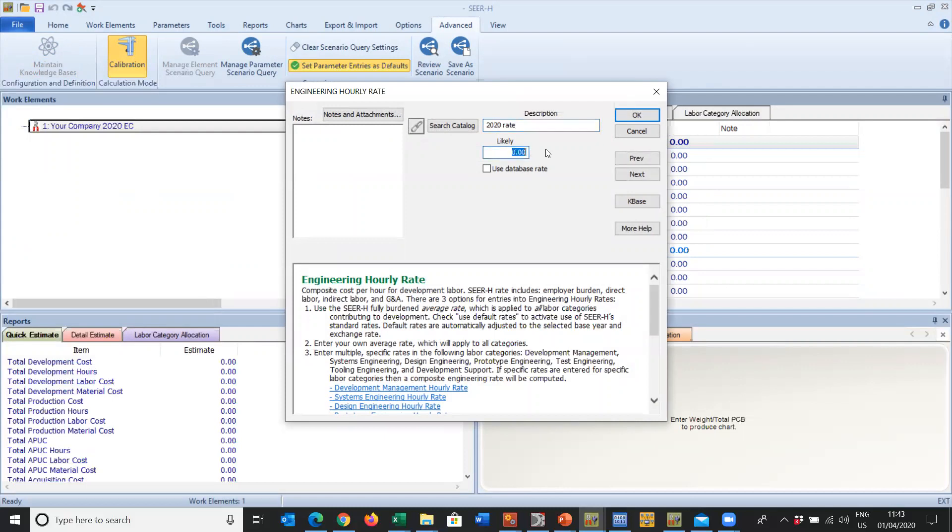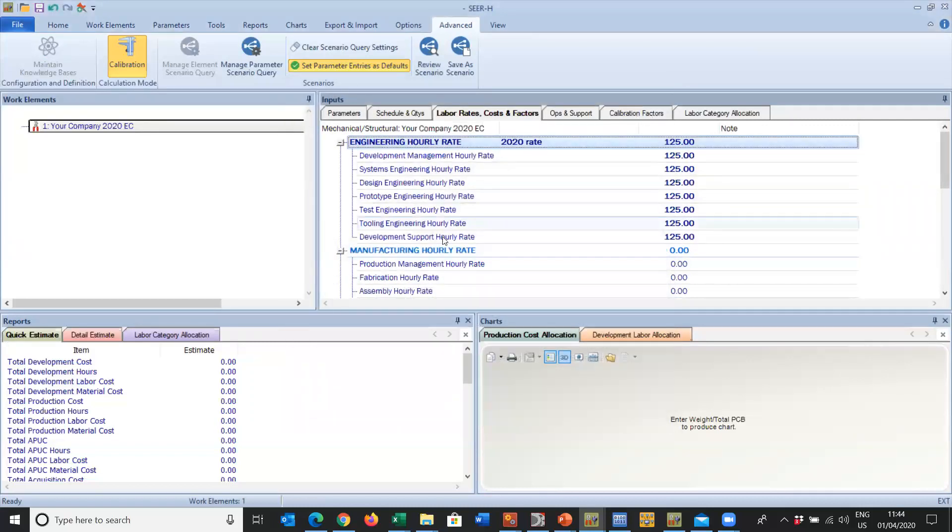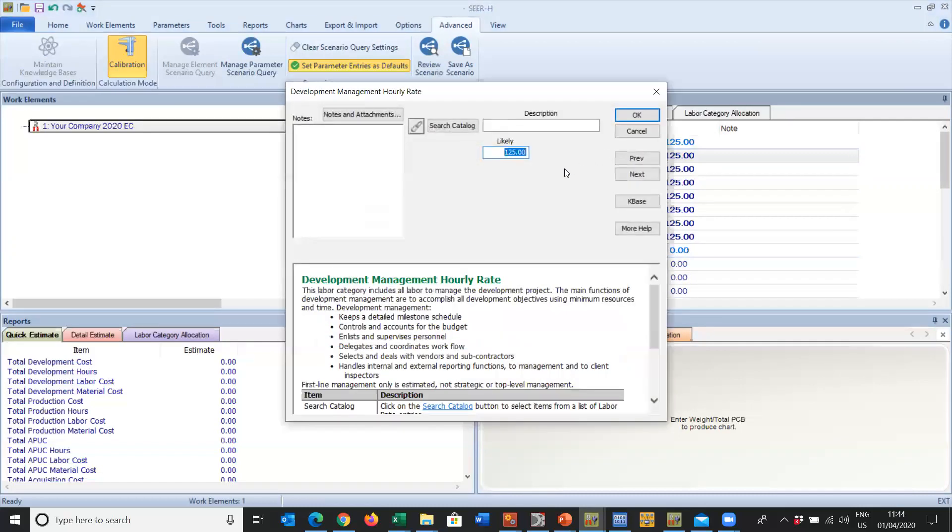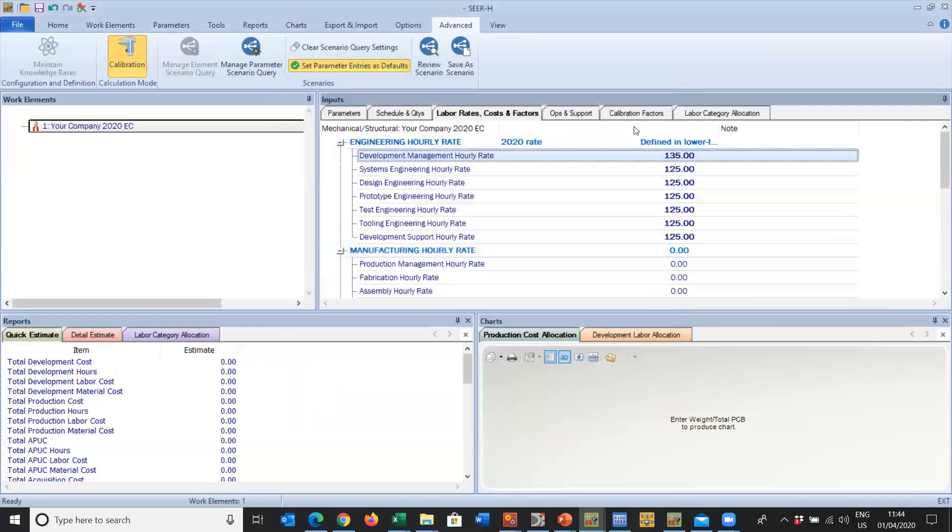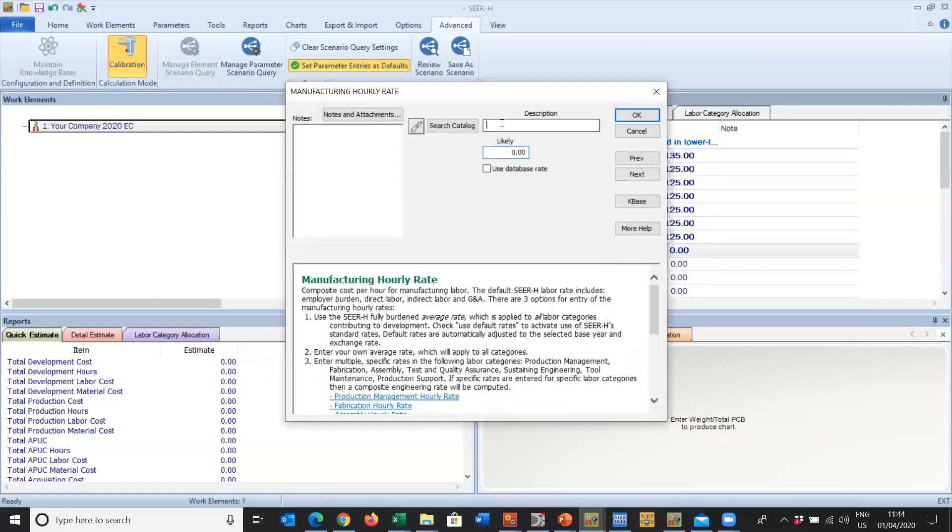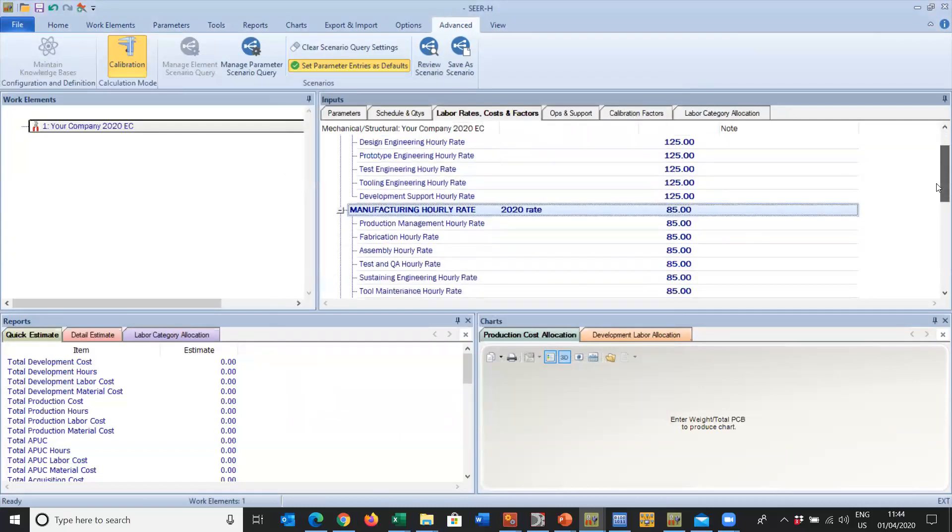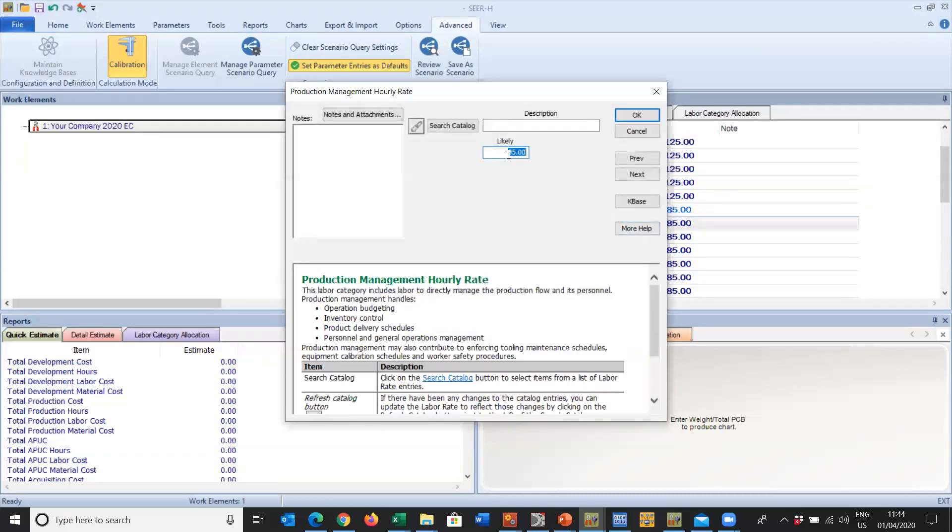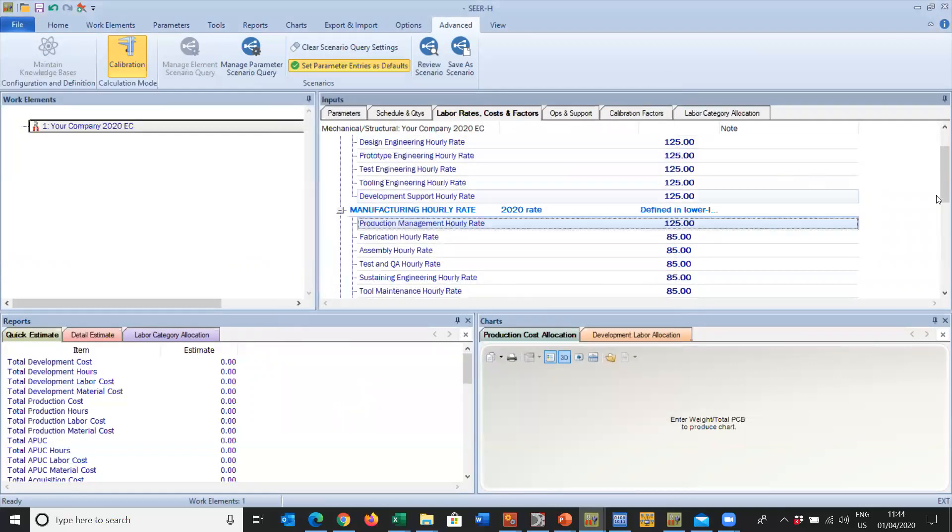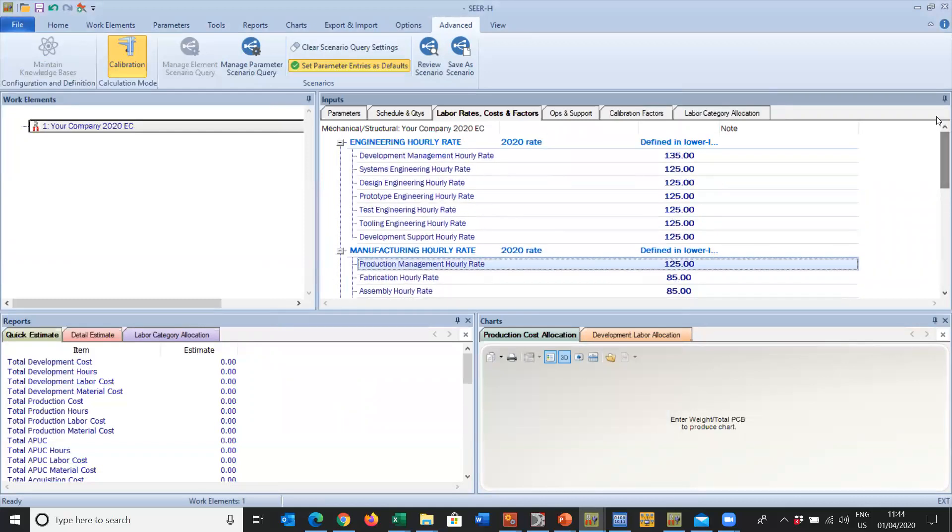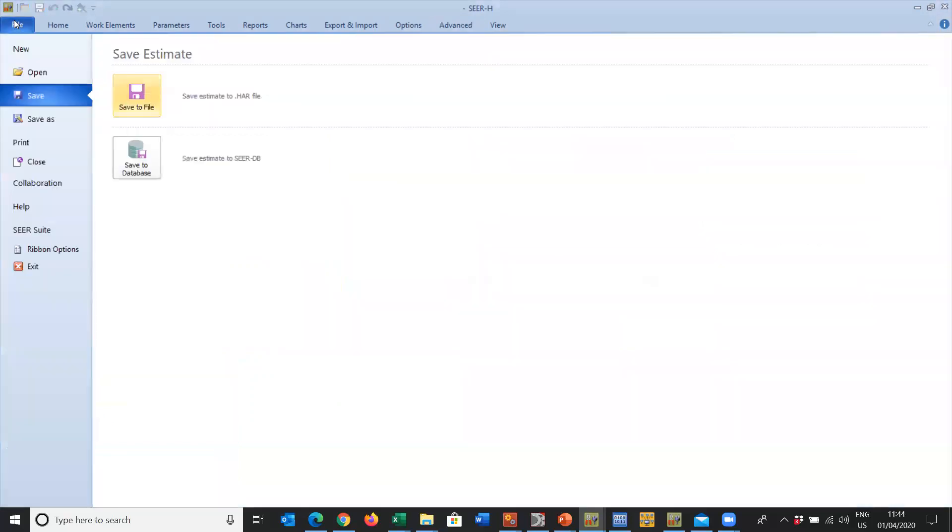Schedules and quantity, again we're not interested. We'll set that up as we go. But this is where we want to go. Our company in 2020, these are our 2020 rates. Our rate for today is 125, click on Okay. However, we do like to pay our managers a little bit more, so we're going to give them 135, click on Okay. Again in production, we're going to put a small note in there and we're going to pay everybody 85, click on Okay. Again, managers like to be paid lots more, so we'll pay them 125.